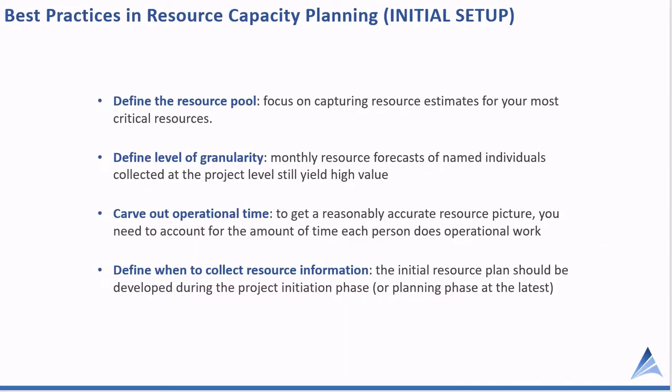When we talk about resource capacity planning, there is some initial setup, and we've got four basic points here. We'd encourage you to take a look at our blog that goes into more detail on this. The first is to define the resource pool. We would recommend, to get started, focus on those resources that are most critical.